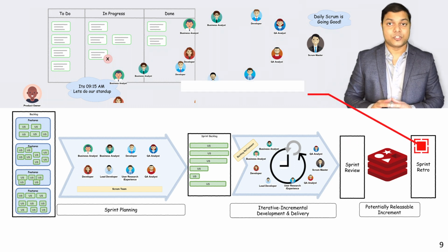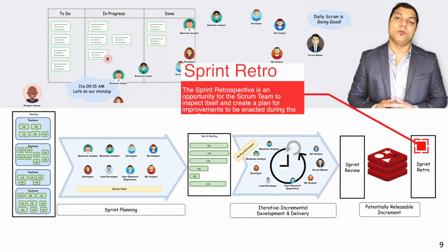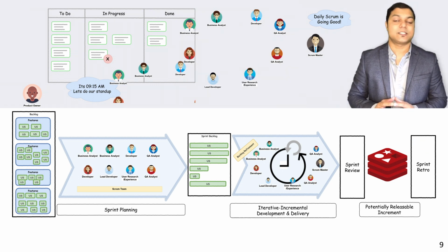Then comes the retrospective. The retrospective's main aim is to discuss the results and determine the way to improve the development process for the next step. The team should conclude what went well during the working process and what can be done better during future iterations. When the ways of improvement are defined, the team can concentrate on the next sprint planning.